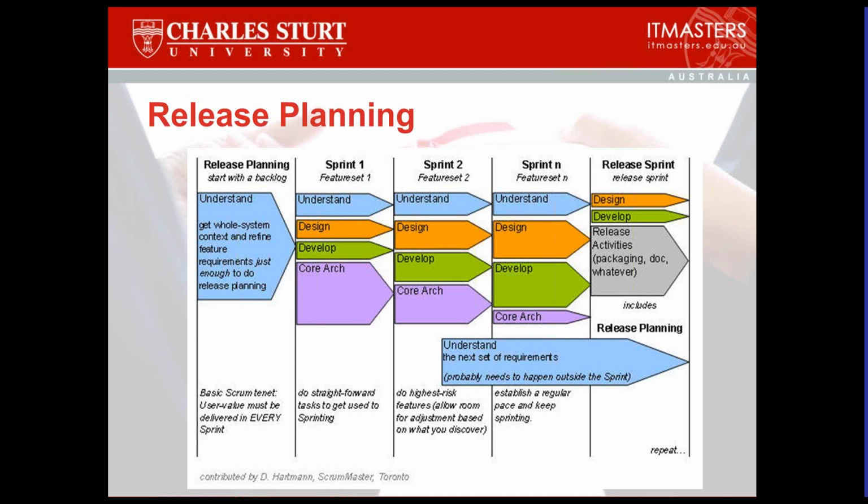So in the beginning, you'll notice the thing listed as core architecture, which is the supporting structure of what needs to happen throughout the project, has a bigger chunk of time and effort up front. We kind of alluded to this already, where in the software example you might be building a database before you're building what goes into it.